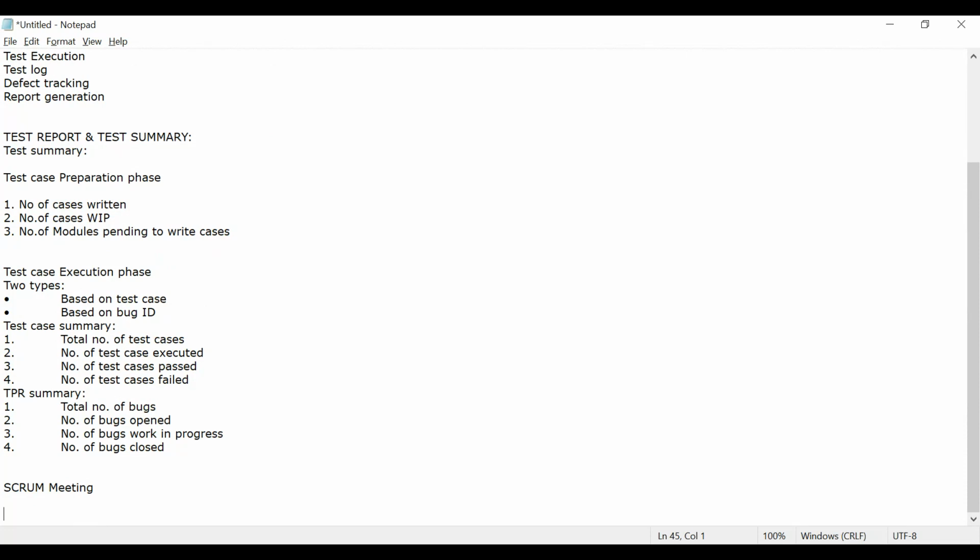It will not take much time other than you saying what is to be done, what was done yesterday, what are the issues and concerns, what is planned today, and is there any escalation to be done which needs to be highlighted to the management. This is the crisp and very clear outcome of each individual person who is working. That is what the Scrum meeting is. And the Scrum Master will track all the tasks.